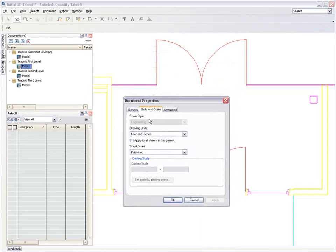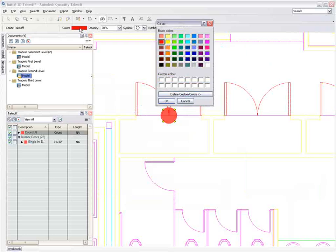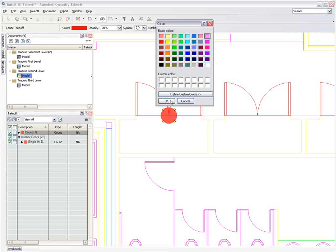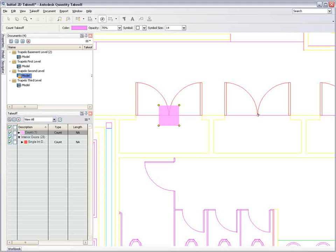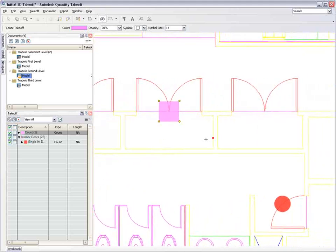Let's focus on some of the manual takeoff tools that are available to you. When quantifying the number of doors on a project, you need a means of marking each door as you count them. Autodesk Quantity Takeoff allows you to use different colored pens and symbols to classify each door type and keep track of the count as you work through the sheets.